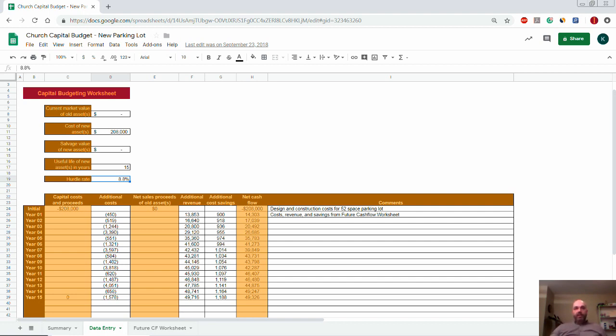But ultimately, this is something that's necessary to do a capital budget. Okay. So, because every increase then the higher your hurdle rate, the more pressure the projects you review are going to be under to be high performing. Okay, they'll have to be to clear that hurdle. So, there's also a rule of thumb. Now, each project can have a different hurdle rate, and the rule of thumb there is, the riskier the project, the higher the hurdle rate should be. Okay, more risk, you can expect a higher return. So factor that into your consideration too.